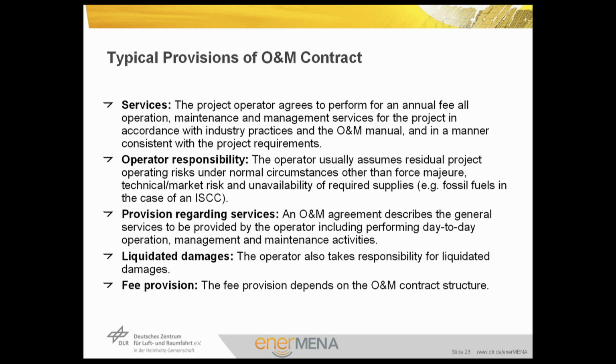Secondly, the operator responsibility. The operator usually assumes residual project operating risks under normal circumstances, but not force majeure, technical and market risks such as the unavailability of required supplies, for example, fossil fuels in the case of an ISCC power plant. Then, provision regarding services. An operation and maintenance agreement describes the general services to be provided by the operator, including performing day-to-day operation, management, and maintenance activities. Liquidated damages, the operator should also take responsibility for the LDs.